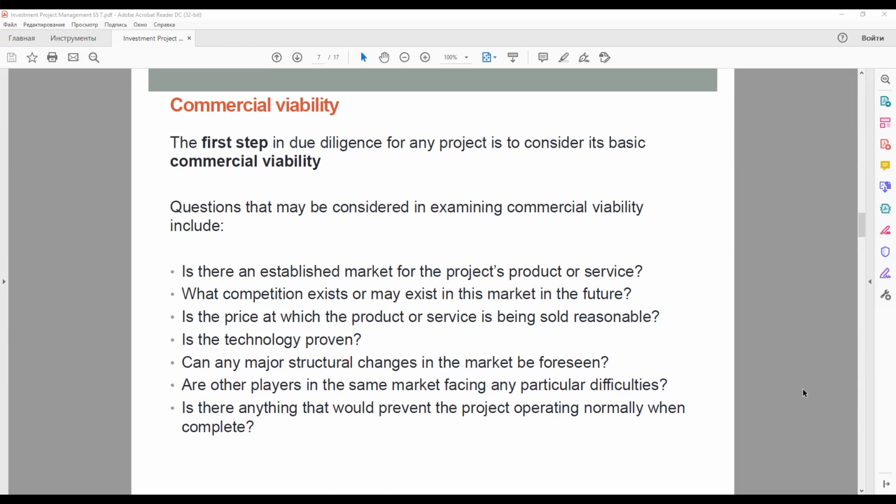And the third example, an input supplier relying on the open market to source supplies faces a large increase in the free market prices for the product concerned, which is not reflected in the long-term sales price in the input supply contract, because the contract price is not linked to the free market price. Disputes and even default in an input supply contract are highly likely.